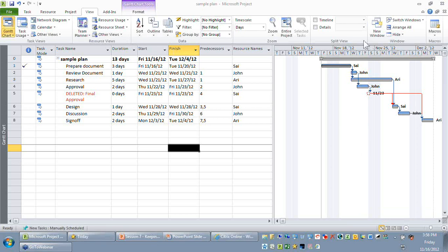Remember, today's topic was not too elaborate in terms of tracking actuals. The purpose of me going to the tracking table was just to explain the difference between the entry table, baseline table, and the tracking table. The baseline table is static, your tracking table contains your actuals, and your entry table is just your current start date, finish date, and the current effort of your entire project.